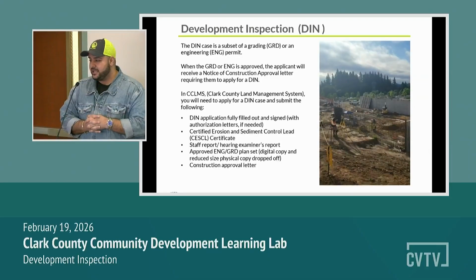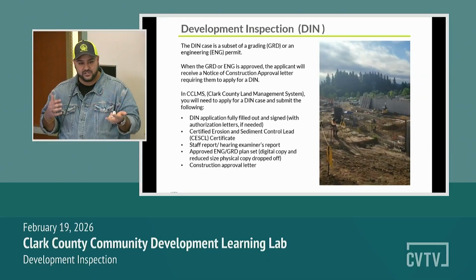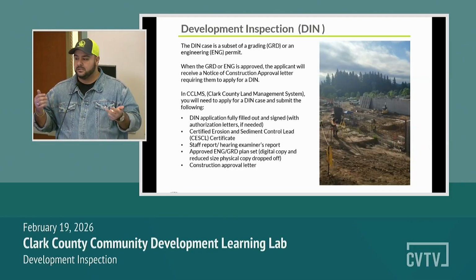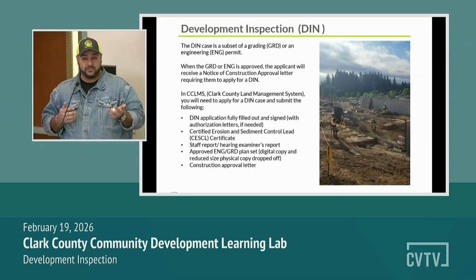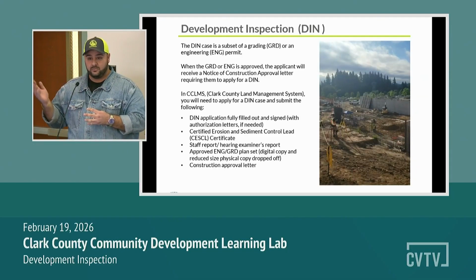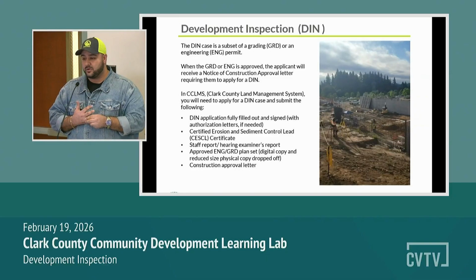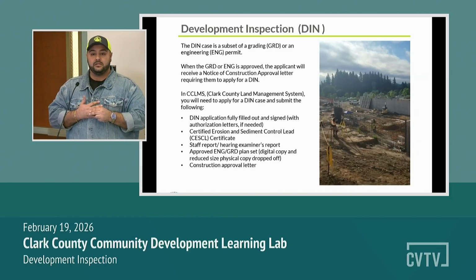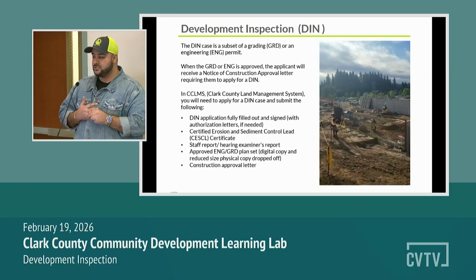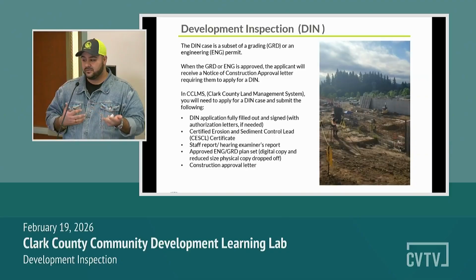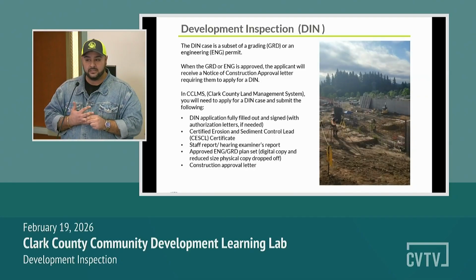So the development inspection case is a subset of the grading and engineering case. So you'll never have a DIN unless you have one or the other. When the grading and engineering is approved in your engineering case, the applicant will receive a notice of construction approval letter from one of our staff in the office that requires them to apply for a DIN case. So what we use at Clark County is CCLMS, the Clark County Land Management System. You'll need to apply for a DIN through that. You'll create your own account, submit for a DIN case, obviously following either your grading or your engineering project,